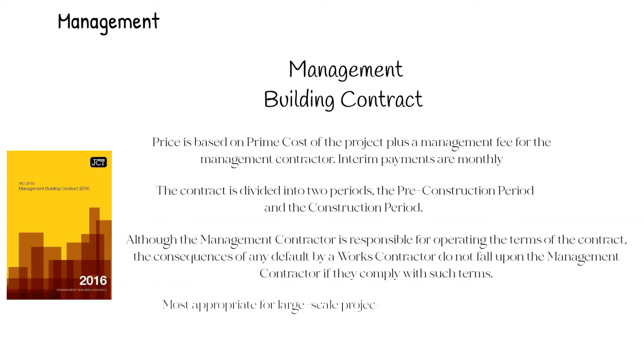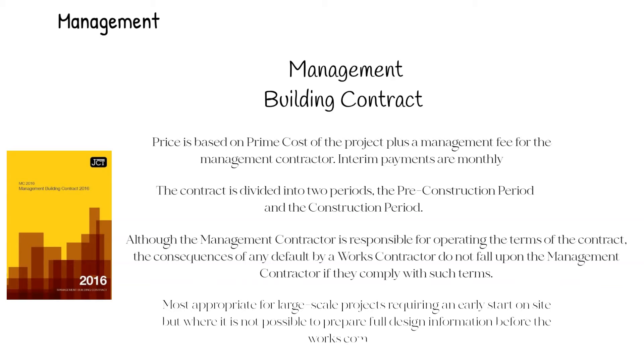This contract is most appropriate for large-scale projects requiring an early start on site, but where it has not been possible to prepare full design information before the works commence.